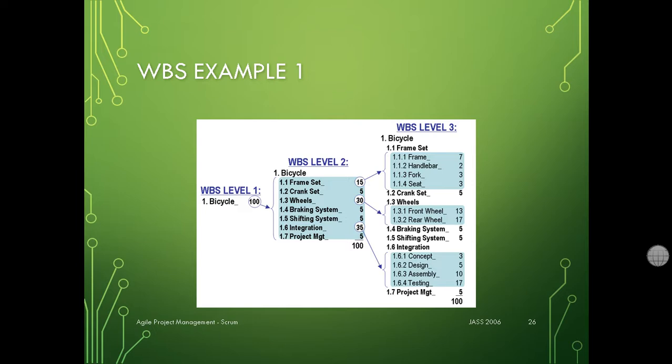For these points to be realistic, my colleague told me that they probably follow what they call the Fibonacci series. Do you remember the Fibonacci series? It's composed of numbers where each is the sum of the previous 2 numbers.